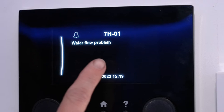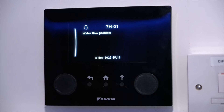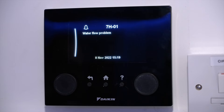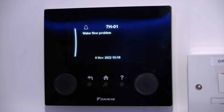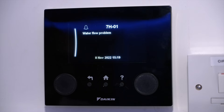The dreaded 7H fault. You will come across this fault when you're commissioning and it's usually down to air in the system. So 80% of the time it's going to be down to an air issue in the system itself.